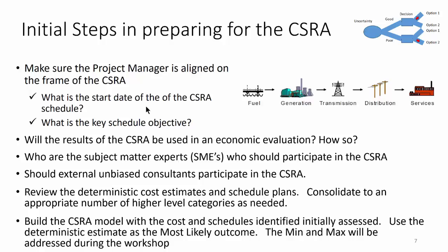That may determine what kind of inputs we're going to need to model the outcome of the CSRA. We need to know who are the subject matter experts and who should participate. Should we have external unbiased consultants participate? Review the deterministic cost estimates and schedule plans, then consolidate those into an appropriate number of higher-level categories — typically 50 to 100. Early on in a project you may only have a few. Build the CSRA model with the costs and schedules initially assessed, using the deterministic estimates as the most likely outcome or P50. The minimum and max, or P10–P90, will be addressed during the workshop.